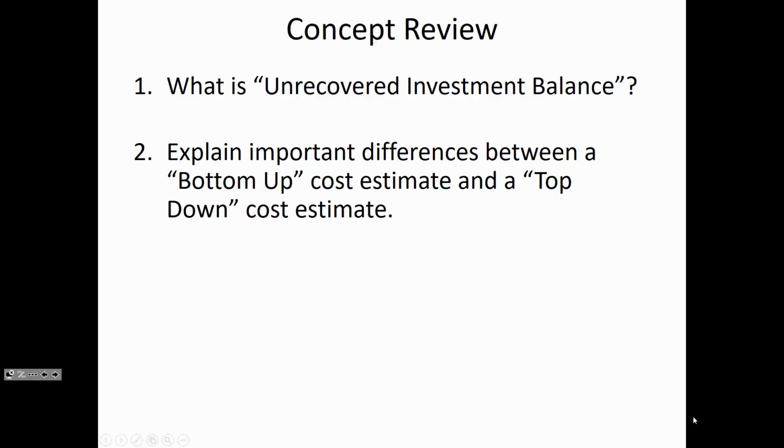Bottom-up is where you take all of the costs that it would take to produce an item, and then figure out how much you want to sell that for. Exactly, take all of the pieces and put cost on that. Very good. So what he said is, with the bottom up, you're looking at the price of each component to tell you how much you should charge for an item.